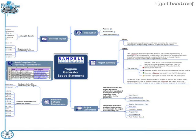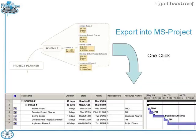Another nice feature in this software package — MindJet MindManager — is the ability to export it into Microsoft Project. In this example, I built a very simple project schedule with one phase, going through the steps of initiating a project, developing a project charter, defining project scope, developing an initial project schedule, and then going into an implementation phase. It's a rudimentary schedule, but it's the result of an initial high-level conversation with the business on where we want to go.